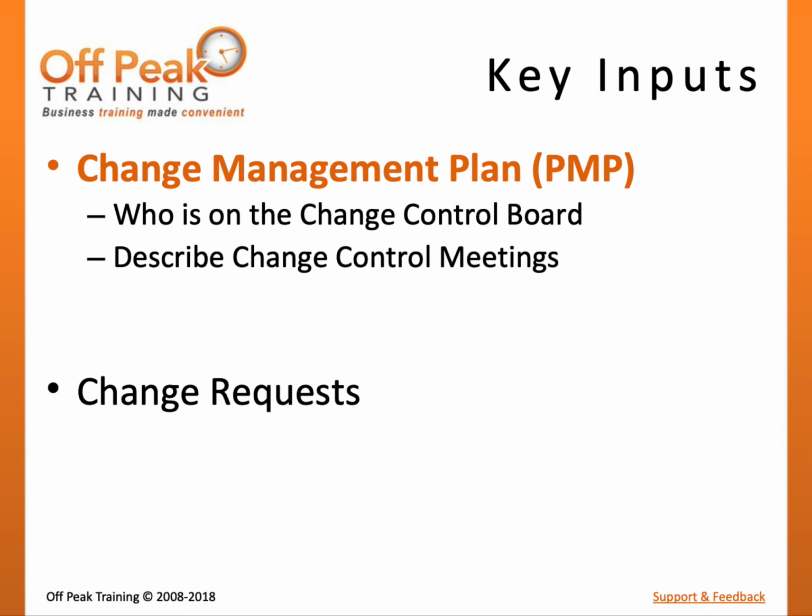Describing the change control meetings. How frequently will the board meet? What type of vote is required for approval? The implementation of a change request form to standardize the information required to issue a request.